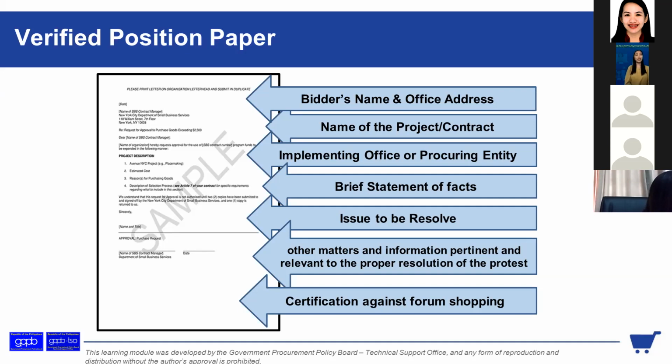So dapat verified talaga, hindi affidavit lang, verified talaga yung position paper nyo na you as the affiant, either the prospective supplier or the manufacturer or his authorized representative, has read and understood the contents of the verified position paper and that the allegations therein are true and correct based on his knowledge of the facts or authentic records.